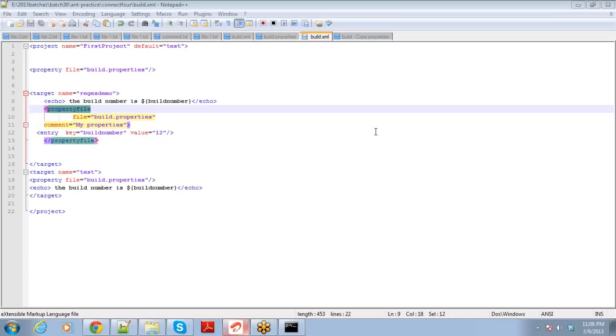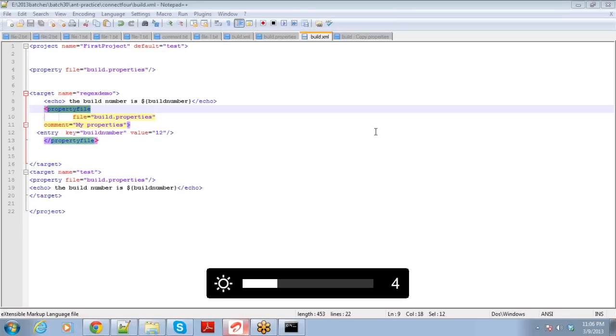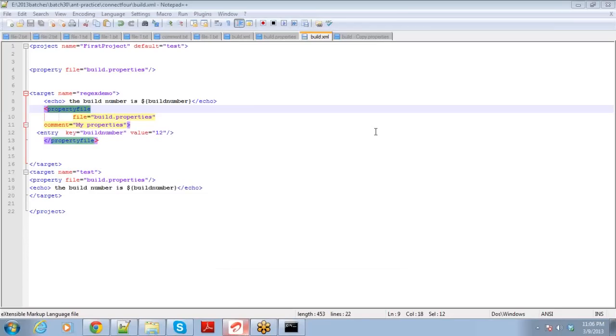In Scrum, for every release, we have a set of sprints. For us, a sprint is 4 weeks. So every time we follow the Scrum model. In every sprint planning, we look at the requirement backlog, and from it the team will pick up the priorities and make them the sprint backlog.